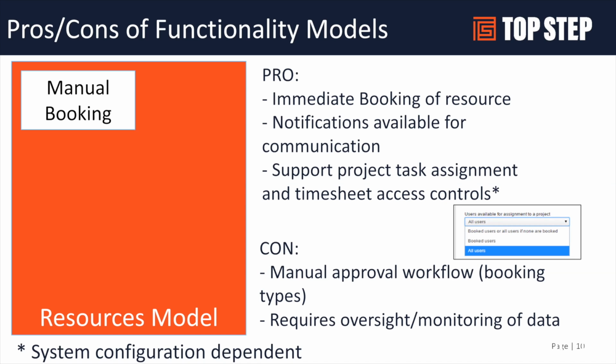under the project settings, you can determine how a booking impacts a task assignment. And so a lot of customers will say they have to be booked to the project in order to be assigned. And this really supports a decentralized model where you are requesting resources.